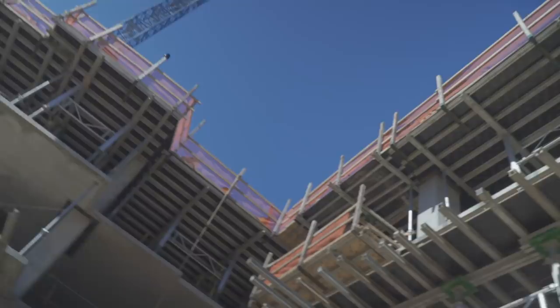So the logic up there after the jib creeps down 2 days, what do you want after that? Perfect world, we pour it on a Friday and the weekend, and then we're back on it on Monday. We can start the door trim 2 days afterwards, because it's going to be a couple weeks before we do the LVT. We can go ahead and final paint your ceilings, and we can go ahead and final paint your closets. So that would allow your mechanical guy to come in, and your electrician, and they could be putting your vents in. So we can cut you some days right there as we're going through.